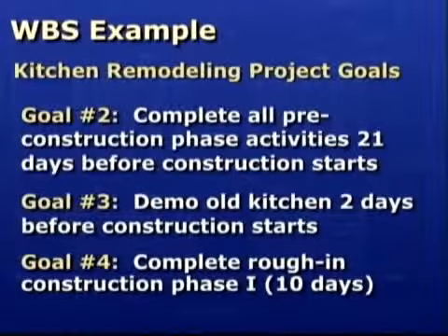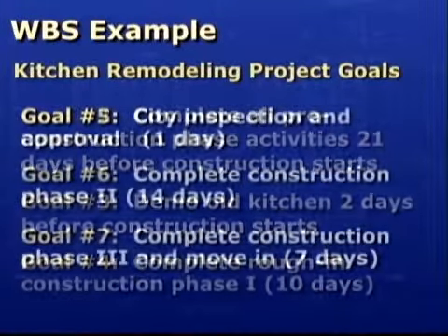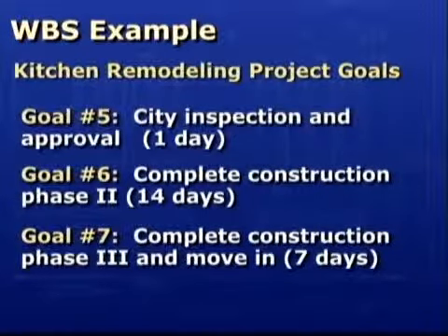I have 7 more goals that involve the completion of sequential construction phases. They are a pre-construction phase, an old kitchen demolition phase, then phase 1 of the construction cycle that includes plumbing and electrical rough-ins, a brief city inspection phase, and then 2 more construction phases.